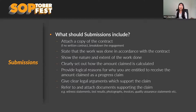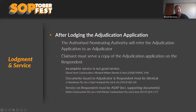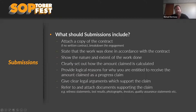That also goes toward giving clear legal arguments that support your claim — that's usually where we assist most in adjudication applications, looking at case authorities and establishing contractual rights to payment. You should refer to and attach any documents supporting your claim. A witness statement doesn't have to be from a director — it could be a project manager or site supervisor, whoever can provide a good account of why there's entitlement to payment. Test results, photographs, invoices, quality assurance statements, emails, external reports — anything showing entitlement to payment. The rules of evidence don't apply in the same way as court, but well-put, succinctly stated, clear submissions go a long way.